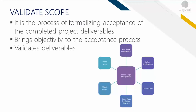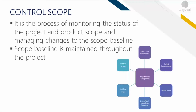You have to validate the scope, which is the process of formalizing acceptance of the completed project deliverables. The key benefit of this process is that it brings objectivity to the acceptance process — if you have a detailed WBS and a well-scoped plan, it's easier for all stakeholders to accept, whether that's the client side or internal senior management. Control scope is the process of monitoring the status of the project — you don't just create the scope, you also need to control and monitor it to make sure everything stays within the set boundaries. The key benefit is that the scope baseline is maintained throughout the project.